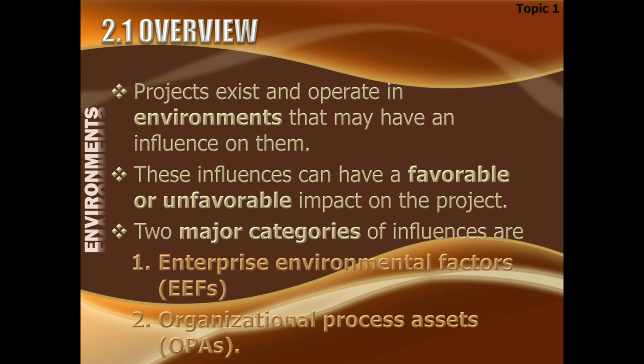So the files, the documents, the registers, the databases, whatever had been created in earlier projects, that all is made available to you. And while you are seeking guidance and help from these documents, you will do your project, and whatever new things you will learn, new knowledge base you will create, that will be submitted to this knowledge base, which is organizational process assets for future guidance to future projects.